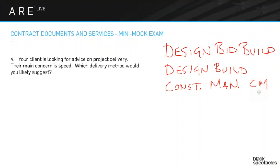The big reason — especially on the exam — that construction manager is useful is that it brings a lot of cost information early on. You have somebody there to help do all the estimates, so the construction manager and the architect are talking about cost and pricing all the way through schematic design and design development. That early cost information is the big advantage of construction manager.